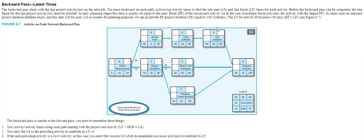So G, E, and F are all 85. Now we're going backwards and we're subtracting, so 85 minus 35, in the case of G, is 50. So we move 50 to D, D minus 20 is 30, and then B, 30 minus 5 is 25. You do the same thing with E, 85 minus 50 is 35, and 85 minus 15 is 70.